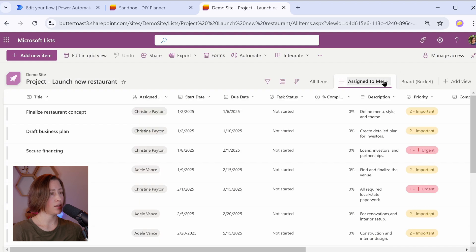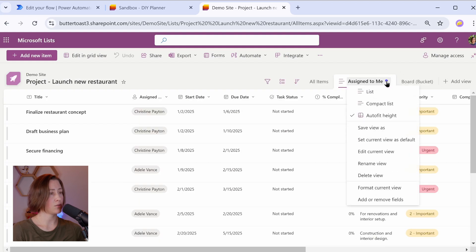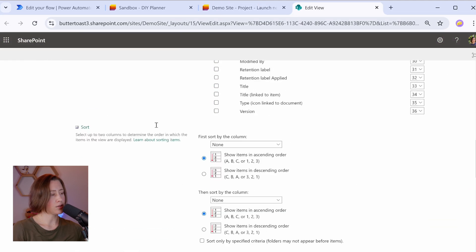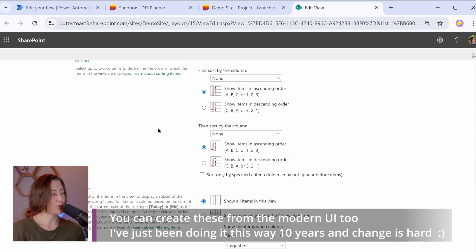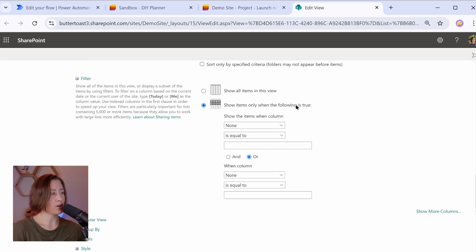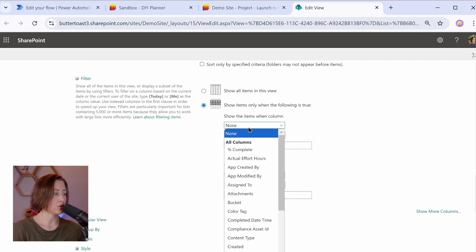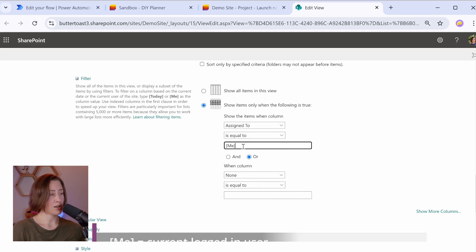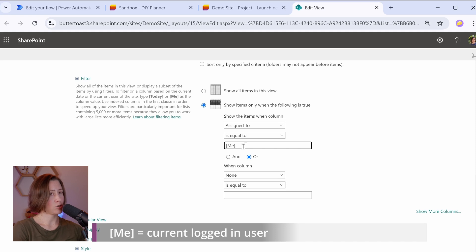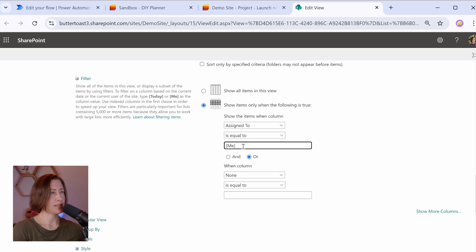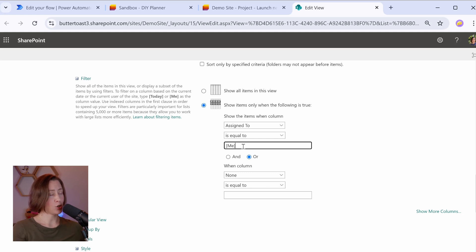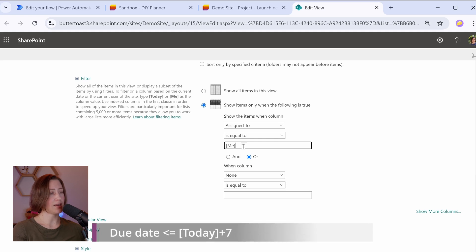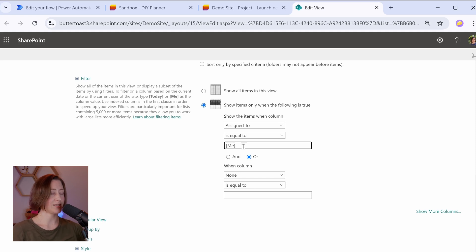And then we are going to in the view settings. So this menu right here, go to edit the current view and that drops us back to this old school view editor. So what we're going to do is we're going to set under the filter option here, show items only when the following is true. And we're going to set this to assigned to is equal to me in square bracket. These square brackets are a magical SharePoint thing that just works. So another thing that you can do with these is you can set them to things due today or yesterday or in the next two weeks. The syntax for that is today in square brackets. So if you do today in square brackets, minus 30, that's 30 days ago, you can do greater than less than there. So if you wanted things due in the next week, you could say with a due date that is less than today plus seven, and then add a second filter on there for status is not complete.